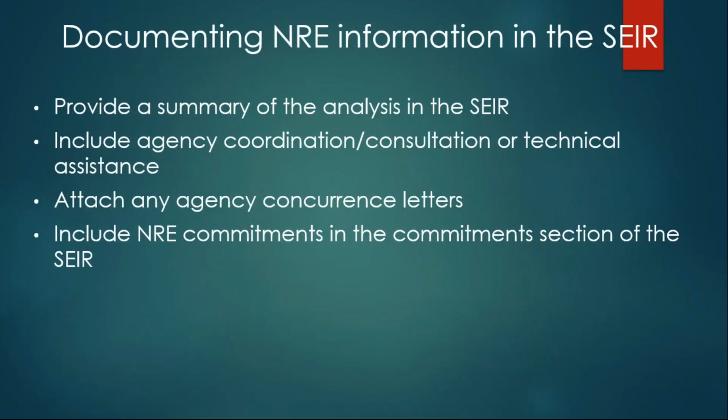So, documenting the natural resources evaluation in the SEIR. I included SEIR mostly for the Turnpike audience today, but similar to what Matt was talking about earlier, we're going to be providing the summary of the analysis in the SEIR, and including agency coordination or consultation or technical assistance information in the SEIR. The NRE itself is not attached to the environmental document, but any agency concurrence letter should be attached to the environmental document.